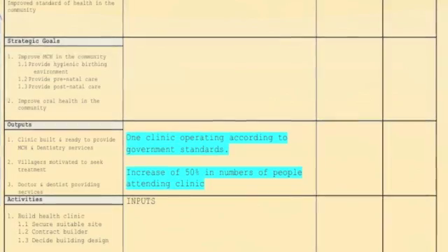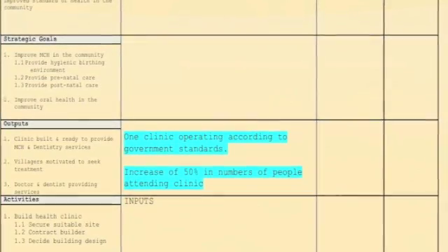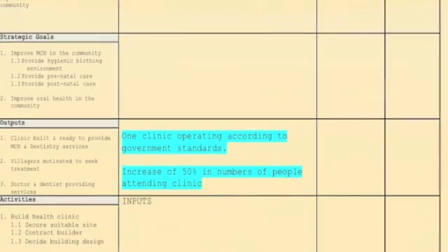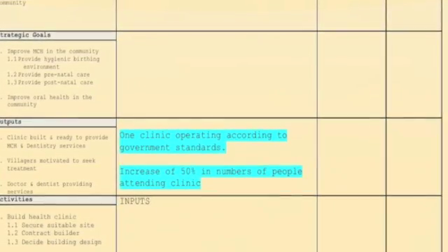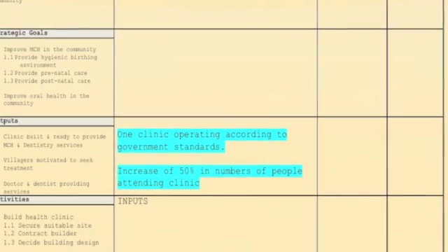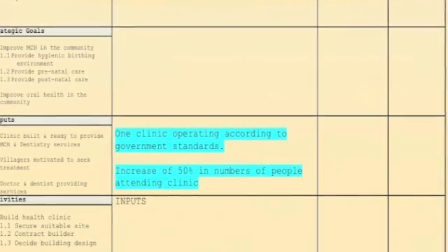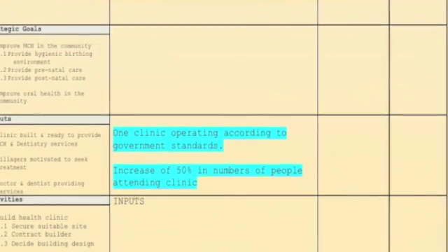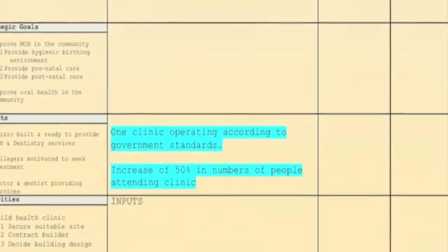The second column of our Logframe asks us to determine how we will measure success. What is the measuring stick that we will use? Well, let's think of our project again. And let's start with the outputs. We can measure these fairly easily. Do we actually have a building? How many patients do we hope to see each week? They are measures of how well the project is doing, of how many runs it's putting on the board.